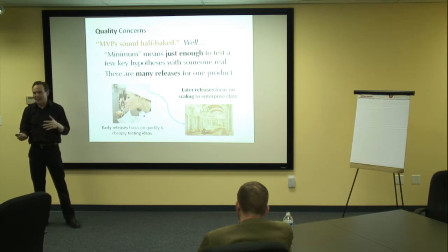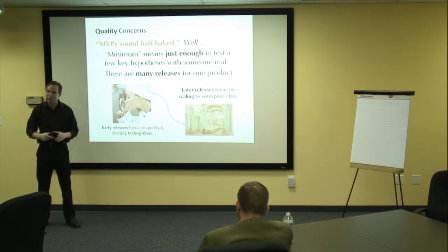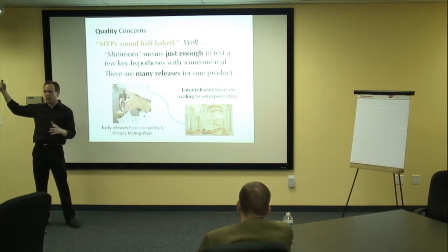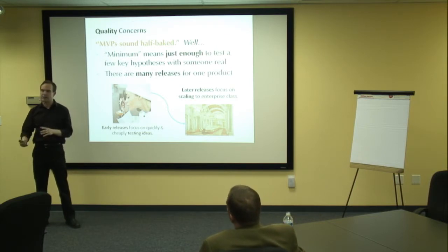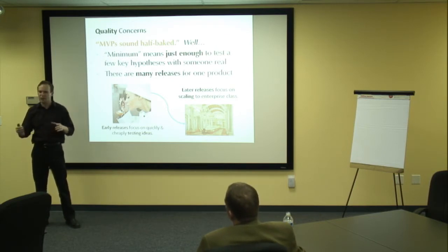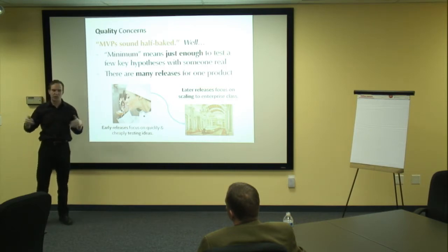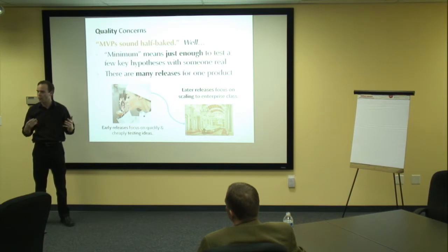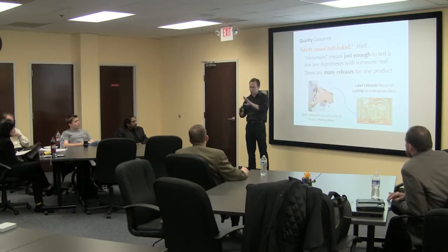So it really would be effectively a prototype that tested whatever the core differentiating feature is, maybe not everything, right? And you try to really bound off those other aspects and address them later. Because you don't care about anything that's rote, anything that's well understood already. Like let's say the pacemaker enclosure was not going to change. You wouldn't even worry about that, right? You would just fake the enclosure or just go with an existing one, because all you care about is your new power source. That's really the thing that's new and weird and different. So I view them in that way. If it's life critical, mission critical, you're trying to test in an environment that wouldn't actually expose it to those things in the early stages, probably.